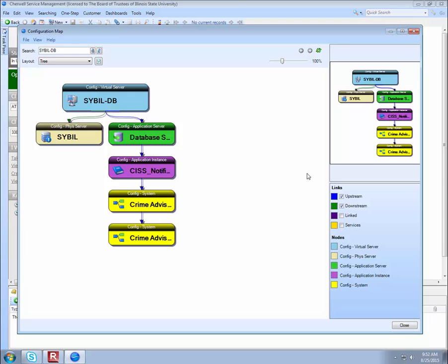And then you'll see a bunch of other items show up also underneath it. So it's a little bit confusing because it's still underneath, right? So it still kind of looks like this is dependent on these other things, but you'll notice that the arrow color is different. The arrows of upstream items are in blue, the arrows of downstream are in green. So everything that's connected with a green arrow, this thing at the top is dependent on. Everything that's connected with a blue arrow is dependent on the thing at the top.